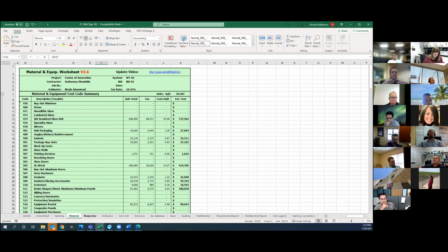And one of the biggest contributing factors of why that is, and the problem that we had, is that the old way that we estimated in the shop was based upon individual parts and pieces. It was based upon how long does it take to fabricate a horizontal? That's 7 minutes, right? Okay, let's get all my horizontals at 7 minutes. How long does it take to fabricate an Inviso vertical? That's 12 minutes. Okay, right? I'm making up numbers here, but it was literally looking at fabrication and assembly as individual little pieces and how long it should take to do those little pieces.